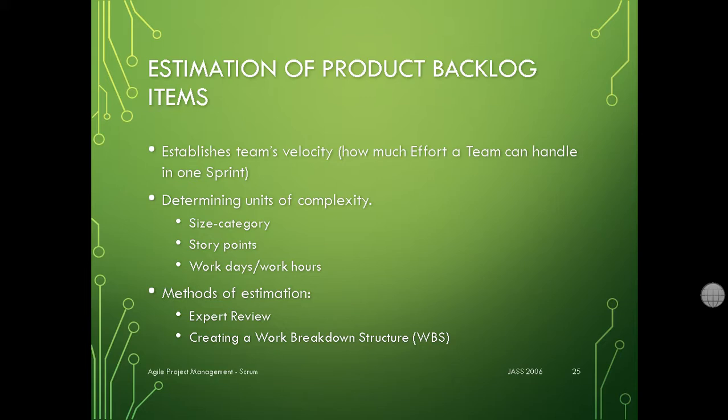For example, if you are very expert, you can say how long it's going to take in hours, but probably you're not. So probably it's going to be a larger margin here, which was work days, how many days that feature is going to take. And because you're just here training, trying to learn something, add a day or two, or add some margin for yourself to learn and test these new methodologies or new techniques you're going to use to do your job. Add more time than you'd expect. If you expect 5, make it 8.